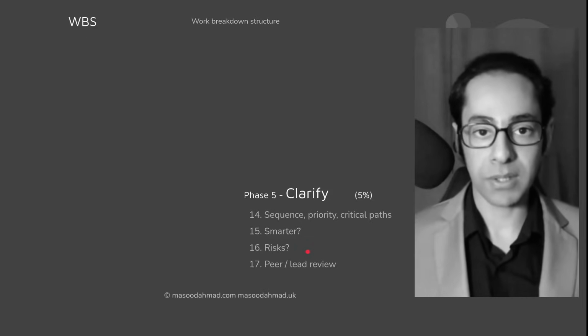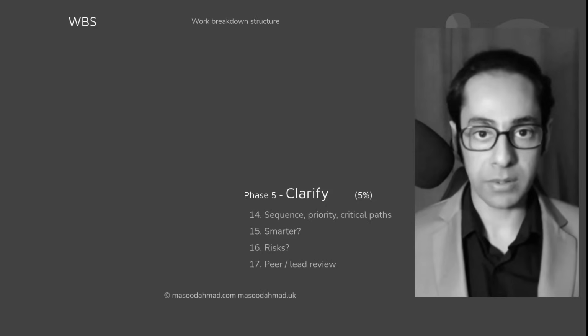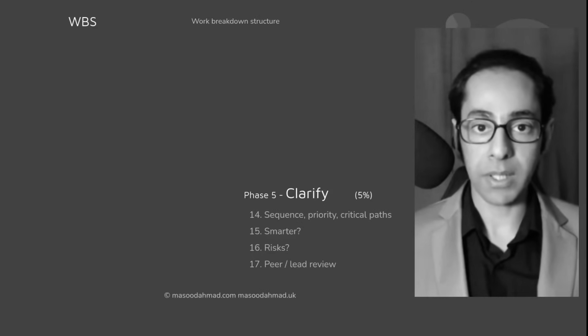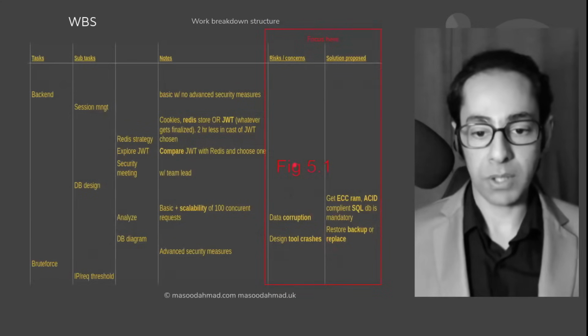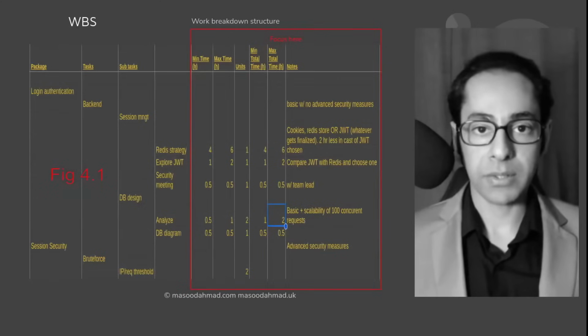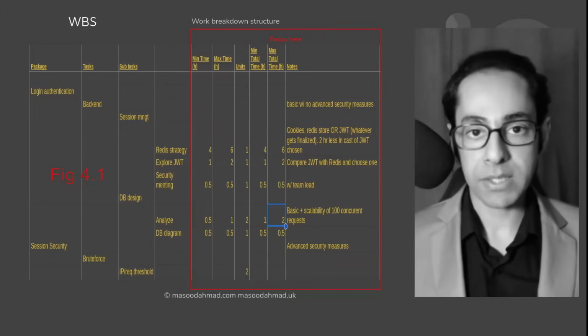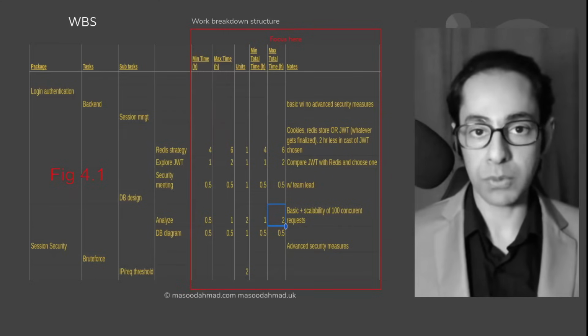For example, the risk of an earthquake, or you think the paint provider or the vendor is not so reliable, the paint material or quality or the product we are going to use or planning to use is not reliable. The database queries are not reliable in terms of the performance. What are the risks of the projects that can harm it in future? It can be anything. Do not hesitate to update the structure or time of the WBS at any stage of the project. With time and phases, you'll get more information, more insights.